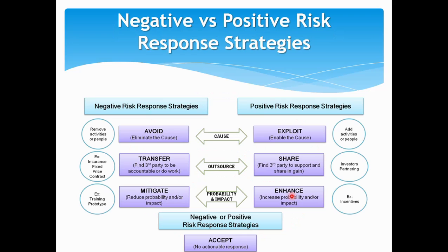The same goes for the positive side. On the negative side, avoid high risk stuff. So remove activities, or try to avoid those. Very high risk stuff, try not to go into that space. Try to avoid, because you're touching your risk tolerance levels. Then for high impact, low probability of happening, transfer to insurance, or some contract level, so that you're fixed on it.